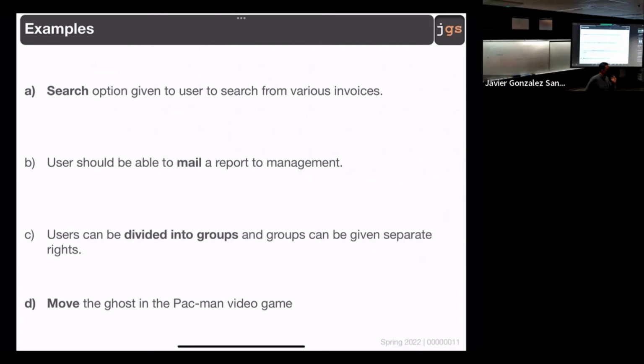Did you notice that the requirement itself is sending the email, and all the other things that I am mentioning are things that are inside of sending the email, particular things that are part of sending the email? So these small things, put the subject, selecting the email of the people that are going to be the recipients of the email, change the font, the background color, all of that are not requirements. They are going to be called activities. We need to talk about them, but we need to be careful to keep requirements not too small, not too big.